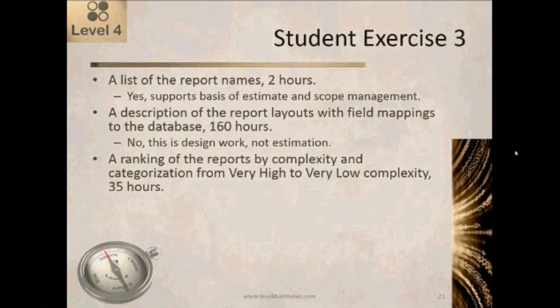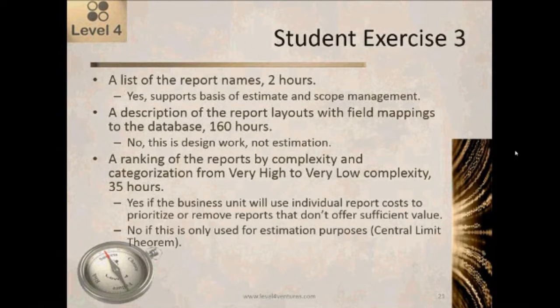Yes, but it's a little bit of a trick question because the answer is no, as you say, if this is only used for estimation purposes because the central limit theorem applies. But here's where the trick question comes in. The answer would be yes, if the business unit will be using individual report costs to prioritize or remove reports that don't offer enough value.